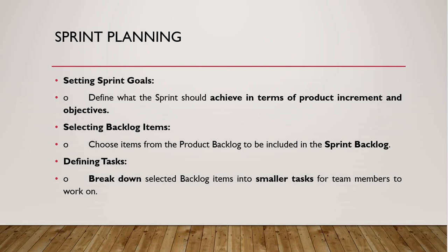Okay, as I said, the development team members include professionals, maybe cross-functional. Maybe some will take care of the design, some will take care of the coding, and then they are going in this defining task. So the task will be broken down from the selected backlog items, and then it will be divided into smaller tasks for the team members to work on.